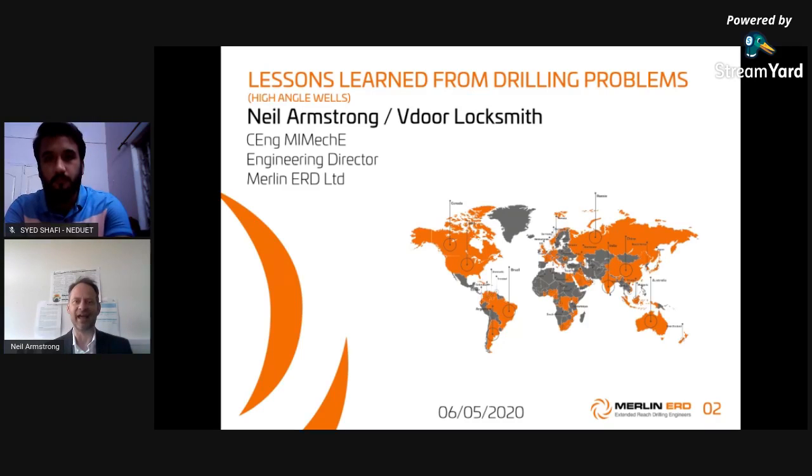Doesn't benefit anybody. It makes operators much more cautious. It makes them much more conservative, adding NPT to wells that they're planning. So really, it then makes some more challenging wells almost impossible to get through the approvals process when there's so much contingency in the original planning basis. So the objective is to share learnings, try and eliminate some of these problems, and generally improve drilling performance.